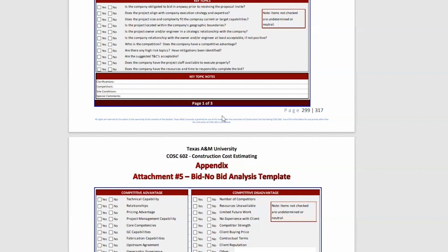So it is the evaluation. Do they normalize the different bids? Do they have some kind of equation where they normalize them? Yes, based on your exceptions. And there are times where we've actually lost bids for that reason. This is all lump sum, by the way. At this time we were bidding very little cost reimbursable work, but the whole concept is bid the drawings, don't bid anything else. But as soon as you wrote a qualification saying this has been excluded, or that's been excluded, that triggered them to say, well, then we think that's worth this much, and they would add it to your bid.